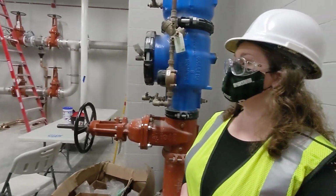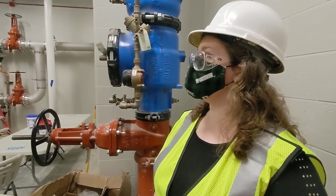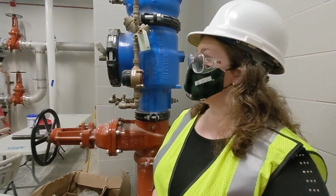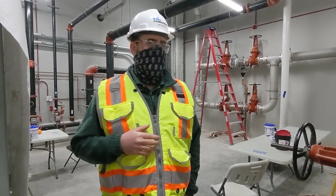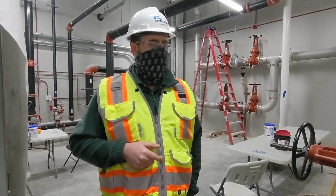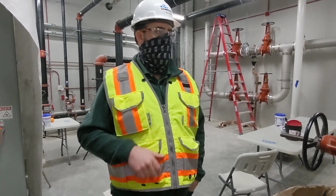All right, so lowering the hierarchy as far as what can be fit is kind of how it goes. You take all the big players first and then fit in all the small stuff afterwards. Correct. Yeah, that's a good statement. And also, particularly in our building here, the pneumatic tube system, the P-tube system, just due to the large sweeps they have to have on their piping, that's also given precedent because in a lot of instances there's not a whole lot of flexibility that trade has.